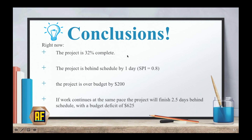Let's conclude. Right now, our project is 32% complete and behind schedule by approximately one day, with an SPI of 0.8. We are over budget by $200. If all continues at the same pace, the project will finish 2.5 days behind schedule with a budget deficit of $625. This was an example of a project where we calculated EV, PV, and AC ourselves and generated the necessary information from those numbers. As you can see, our project is going very badly, so stay with us as we continue our series on project management.